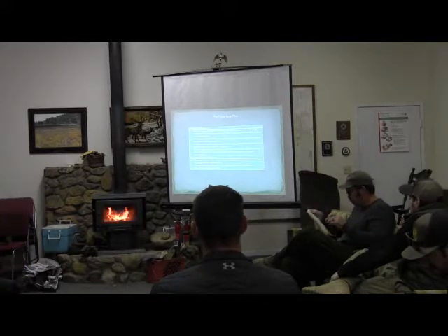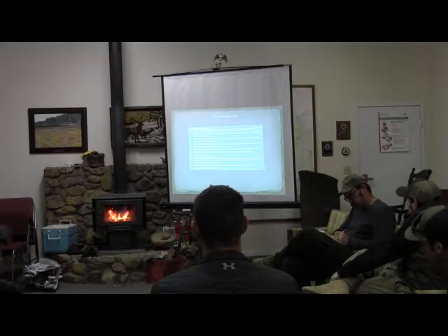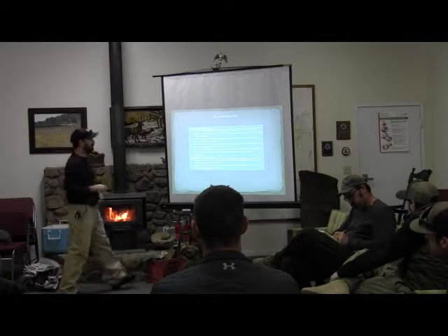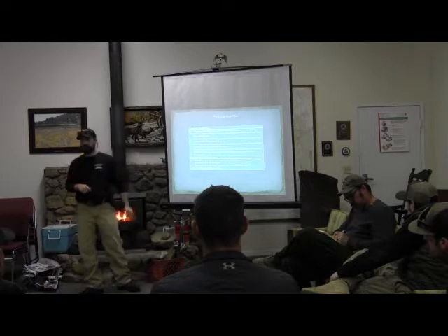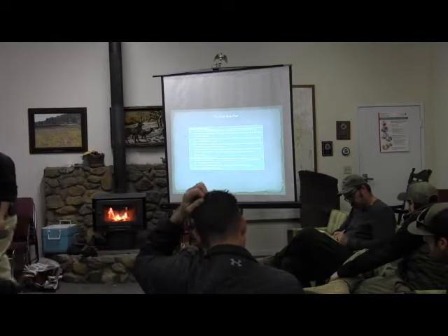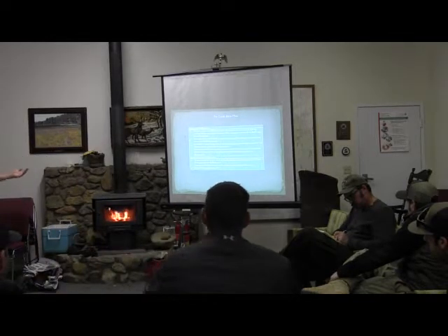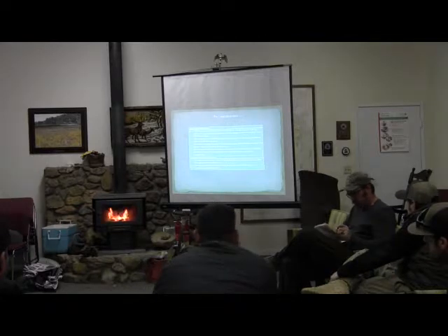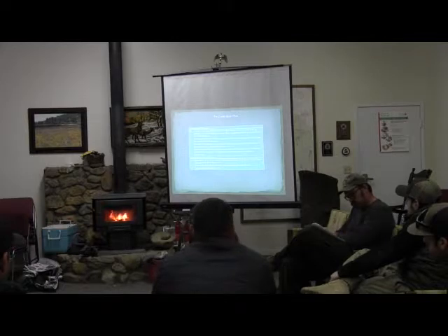So from Fry Creek, there's actually more resource objectives here. Almost all burn plans have a consumption objective. Not always, but a lot of times they do, especially a pile burn plan. It's just a consumption objective. It's pretty straightforward. We want to burn 100% of the piles or 80% of the piles, whatever.